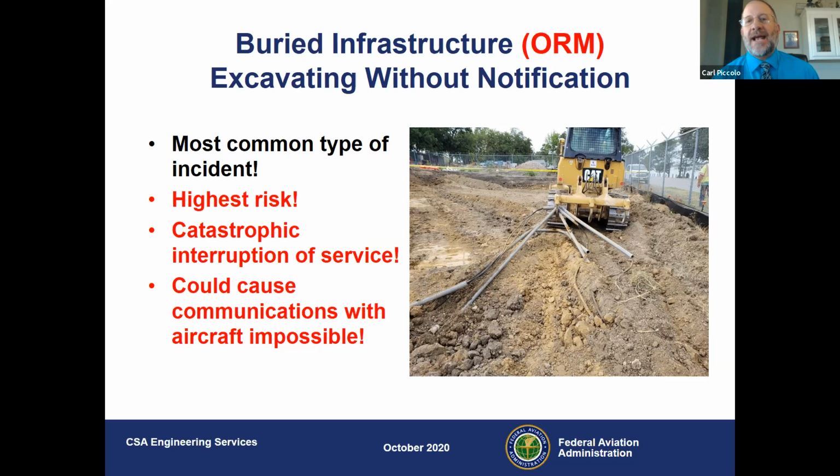So what I'm going to ask you for is, when you're in the middle of a construction project, please impress upon your consultants and your contractors that they have to contact us at every turn. When we have a reimbursable agreement in place, if you're about to start digging in the ground, make sure that our RE is there and helping make sure that you're avoiding that buried infrastructure.